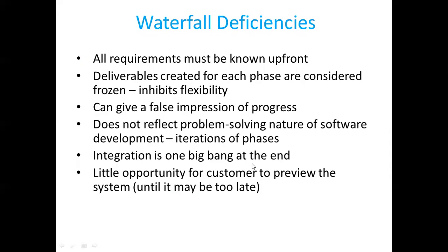Integration is one big bang at the end. The implementation will be done by different people. Somebody will work on some feature, somebody on another feature, and at the end we have to combine all these features together into a single application. So integration is difficult here.